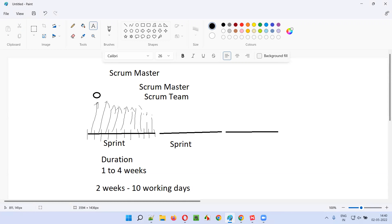In this meeting, the scrum master will ask each and every scrum team member about their current progress — what activities they are doing now, what tasks are completed, what tasks are pending, and whether there are any blockers because of which the team is lagging behind. The team will also assess whether they are on track and can finish the work by the end of the sprint. All such things are discussed during this daily scrum or daily standup meeting.